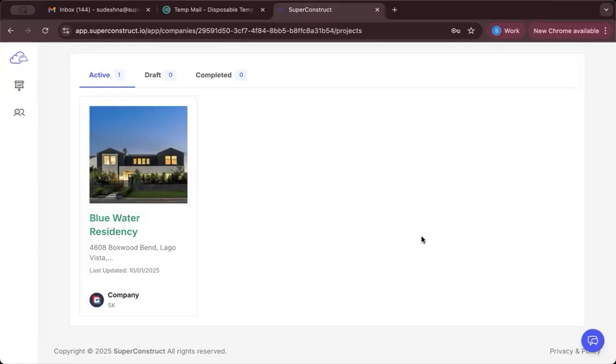Let's look at all the steps involved in creating a pay app, getting it approved by the approver, unlocking it for resubmission by the contractor, or the generation of G702, G703, and getting the UCLW and CLW signed, releasing the payment, and then finally closing the pay app.